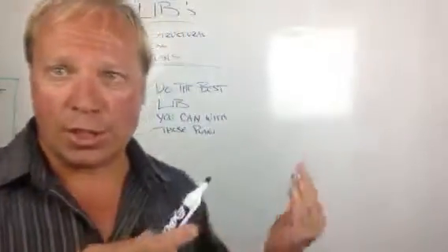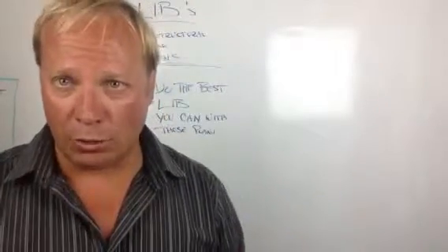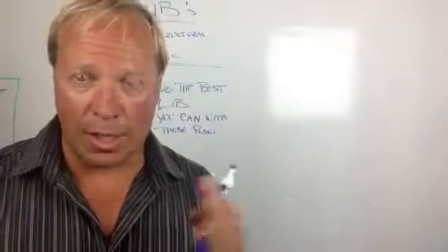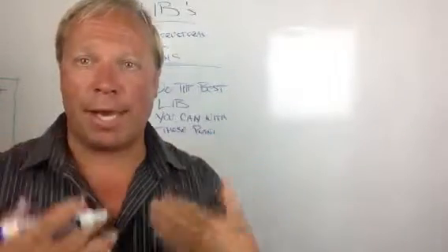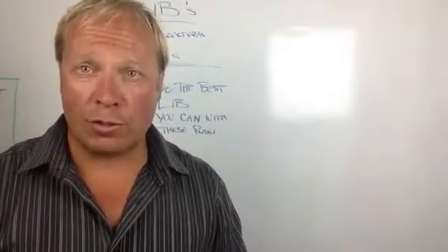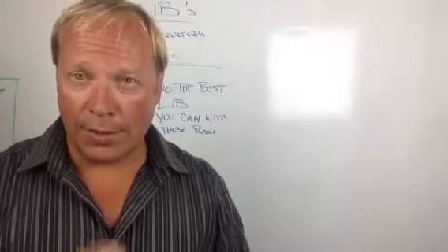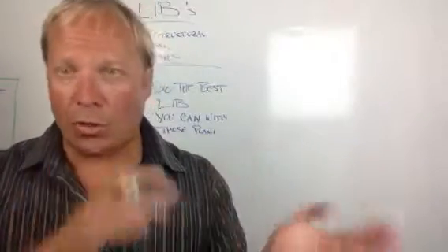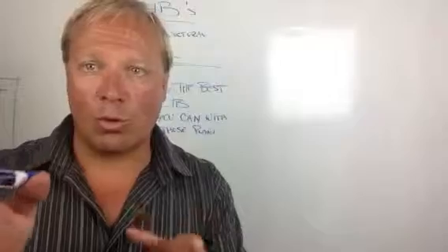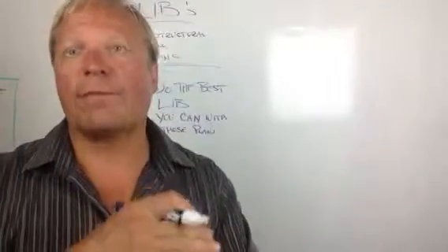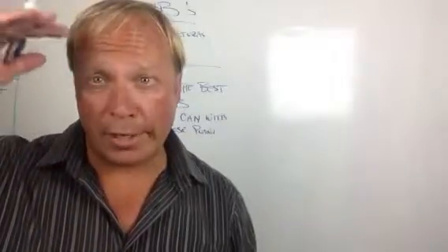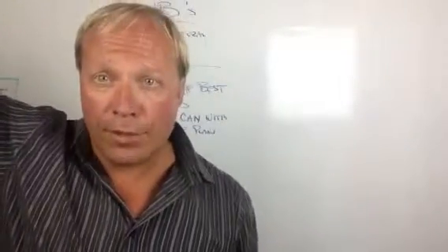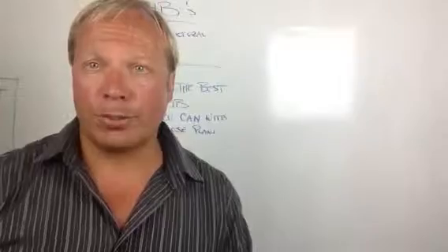So when you get your first initial budget and you're working on your line item budget summary, which is an LIB, you'll do the best you can, then send it back to whoever's reviewing it for the field, and they'll say, oh, no, it's not going to be that much, it's going to be less here, more there, and the footer's going to be bigger, and the stem walls are going to be taller because we're adding a basement. Instead of 4 feet, we're going to make them 8 feet. So there could be multiple change orders.